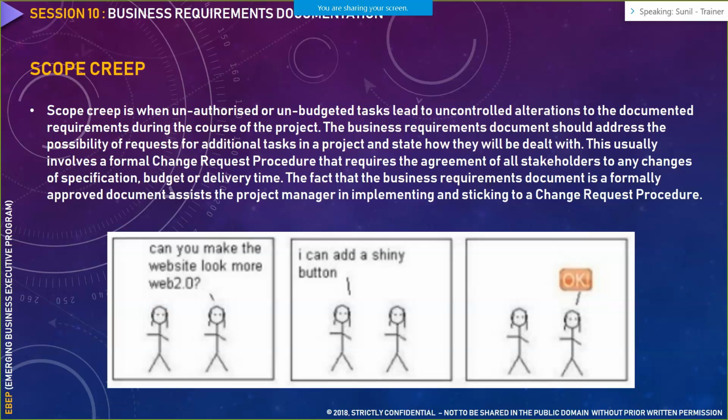You have to clearly mention in the out of scope items that defining the standards of the web 2.0 framework is out of scope. If you miss writing that particular line in the business requirement document, the customer would ask you to deliver free work for them. They would first get their website built for them, and after that they would say you haven't mentioned it in out of scope items, so you are liable to deliver it to us, and you cannot do anything at a later stage.